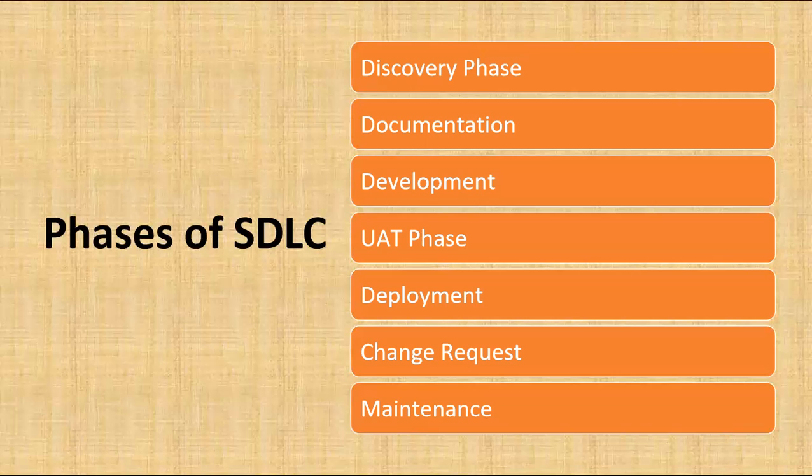If the UAT stage is successful, take the sign off for UAT. Please make sure to take the sign off of the UAT stage. It is very, very important. Once the UAT stage is done successfully, take the sign off. Then we have a deployment stage.